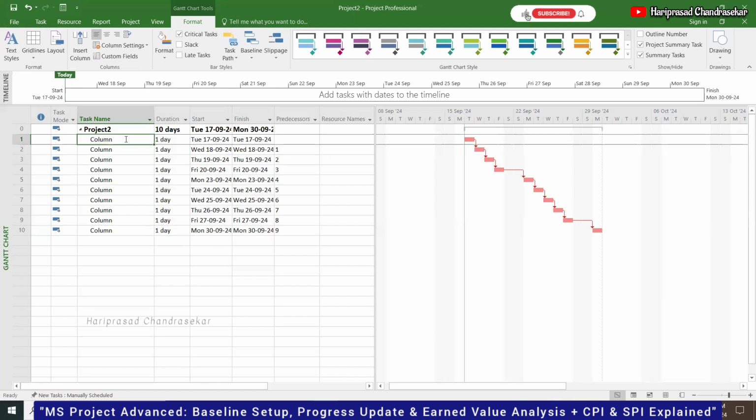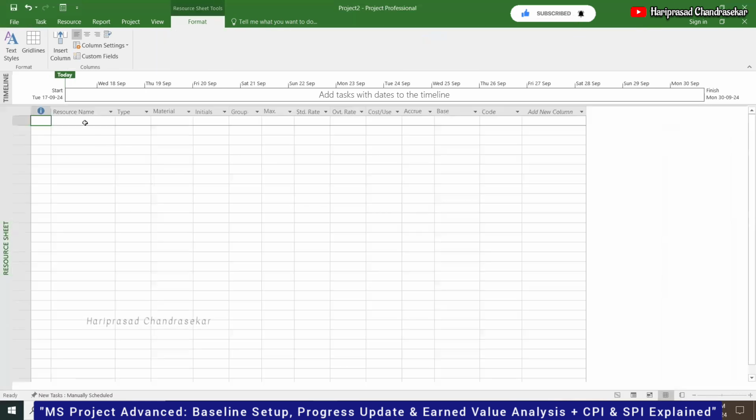So each column is going to be constructed in each day. So it's a 10 days project, one after another. So on day 1, I can put a column. I will consider this as a material. Since column material standard rate, I will put $100 for each column.